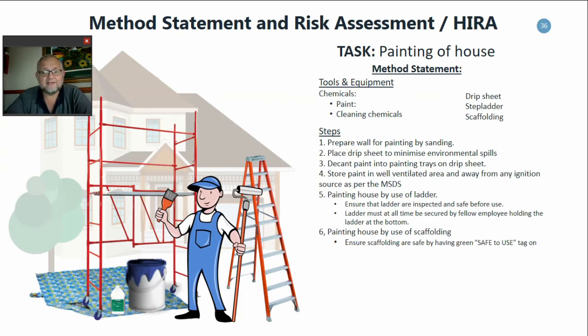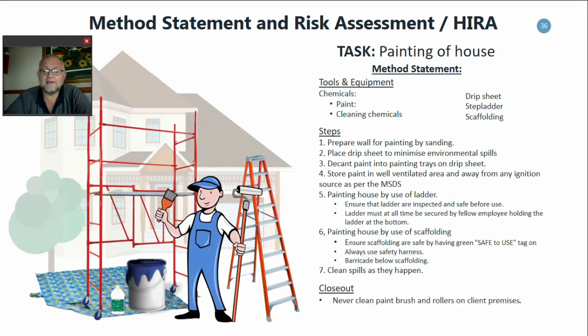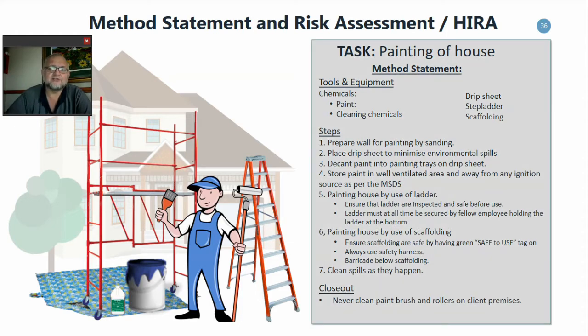sure that the scaffolding is safe before you get on it. Always use a safety harness. Barricade below the scaffolding. Number seven, you're going to clean spills as they happen. And then when you are done, you're obviously going to clean your paintbrushes, but remember, don't ever clean them on your client's site. Now guys, this is just a guideline of what a method statement needs to look like.